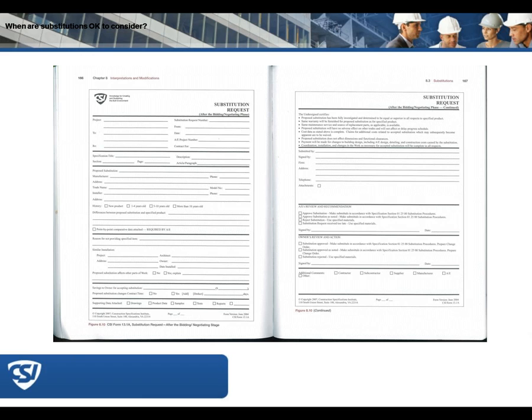Third, that the same maintenance service is available and source of replacement parts is available, so that if one is off the shelf, then so is the other.